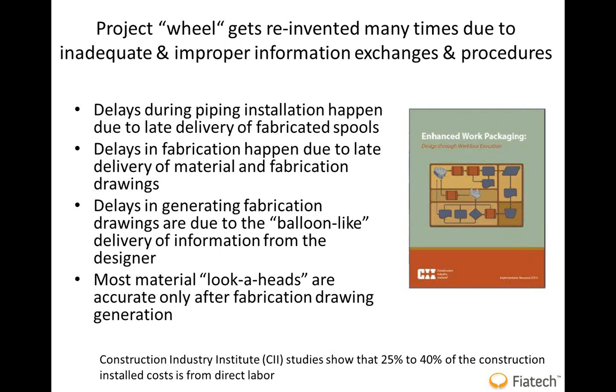And when you want to see the source of this problem, you always notice that the design firm, because they are pressurized to produce drawings, starts sending the isometrics in a balloon-like approach, like you will receive 5,000 at one time. And then the detailing team, regardless of how big they are, will become the bottleneck.